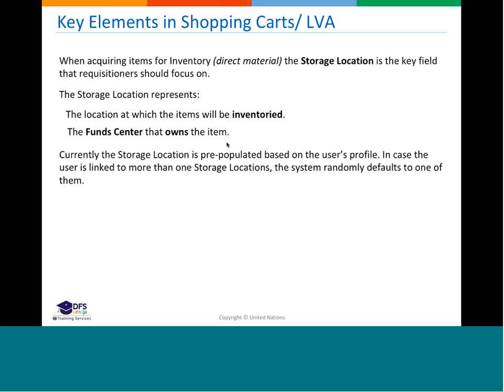Currently, the storage location is pre-populated based on the requisitioner's profile, but especially in the missions that have a centralized acquisitioning unit, they will have access to multiple storage locations. So you as well need to make sure that the requisitioner will select the appropriate storage location. If engineering is going to pay for the item, the storage location needs to be engineering, but not only fund center engineering, it will be engineering in your section, Bangui, Bria, or other regions.